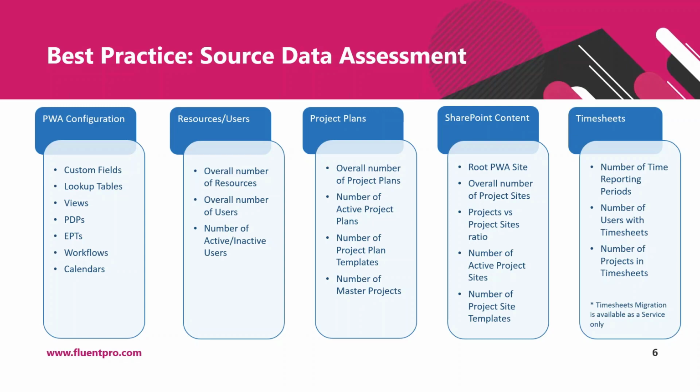As for the project site templates, when migrating to Project Online, it's good to keep in mind that some of the templates might have dependencies on the features that are available in Project Server on premises and are not available in Project Online. If that's the case, then the project site template, even if it is migrated to Project Online, will not work and a site will not be created from such a template.